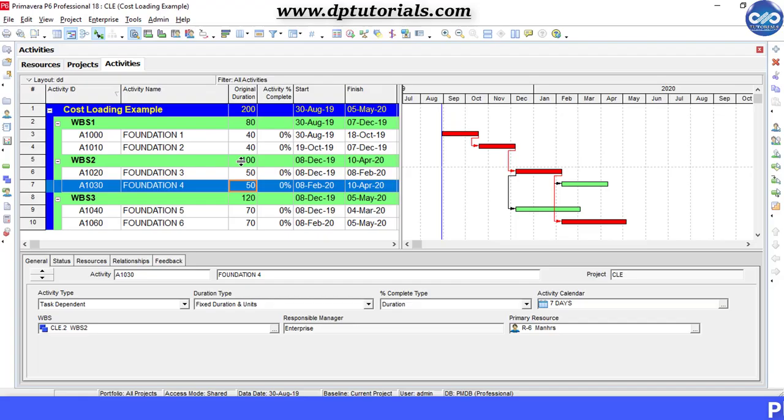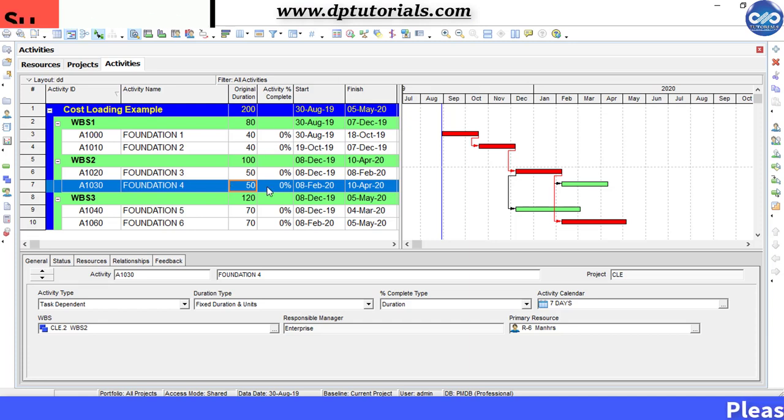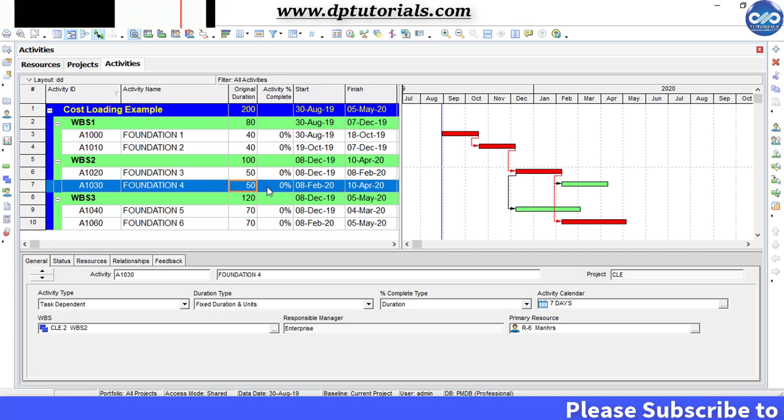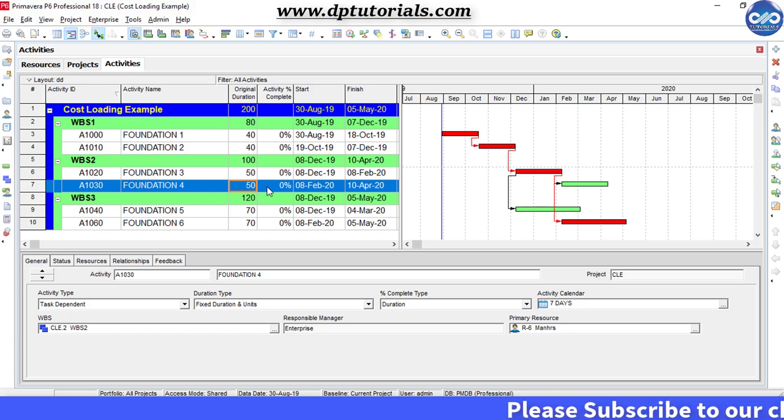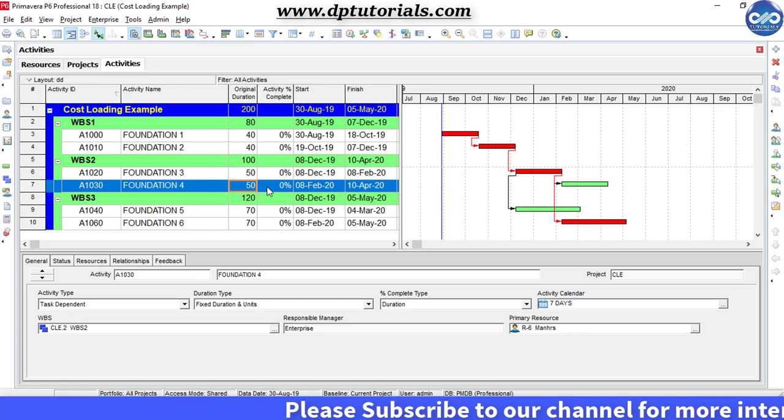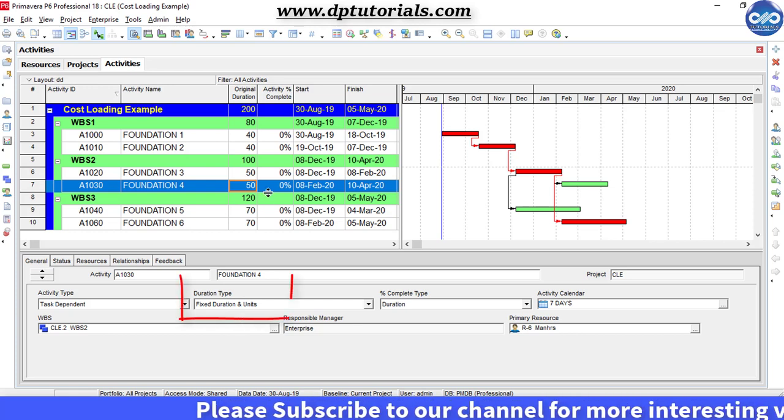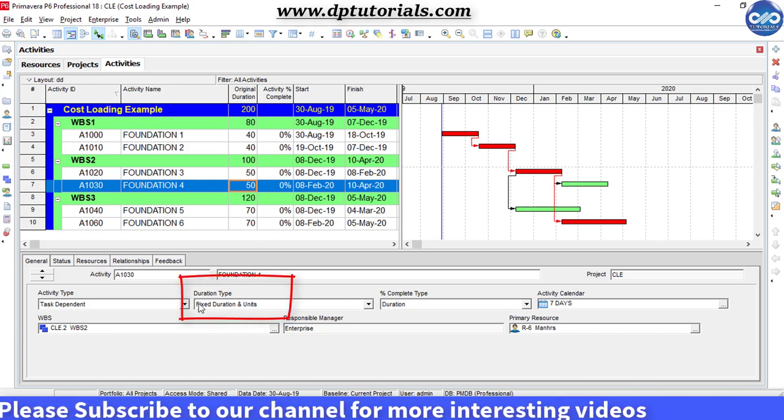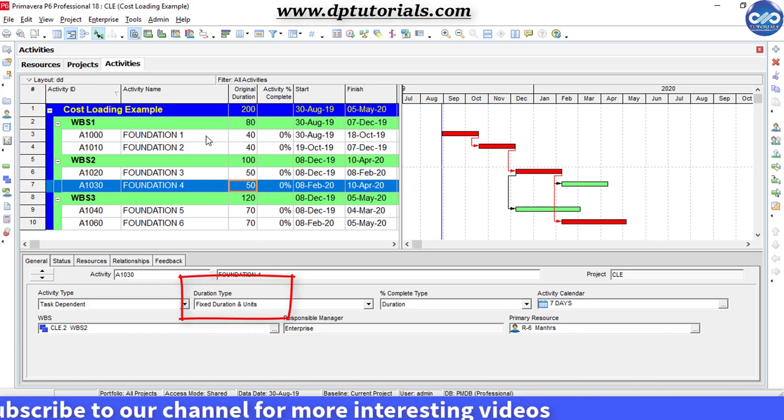Let us now learn in detail how to do the cost loading of a schedule in Primavera P6. This is the sample schedule I am considering now. Make sure that the duration type of activities is fixed duration and units.